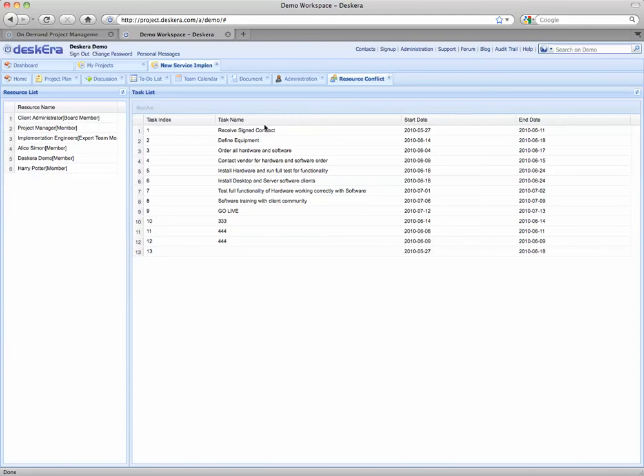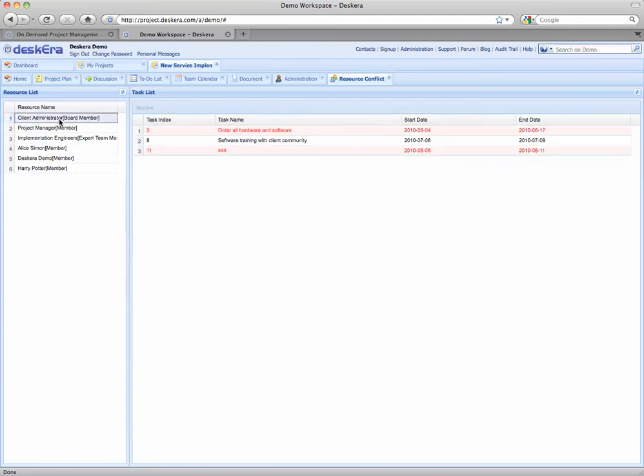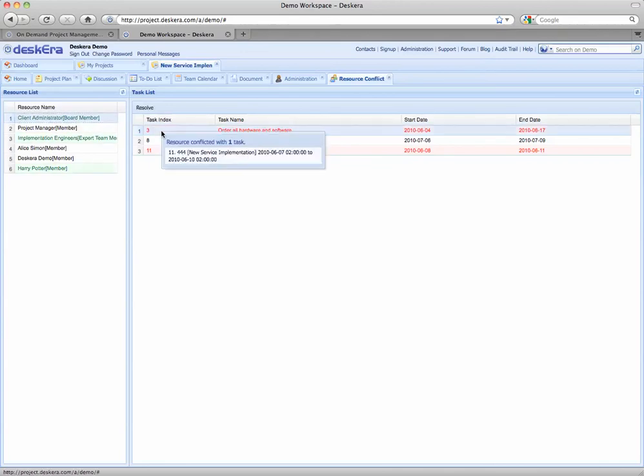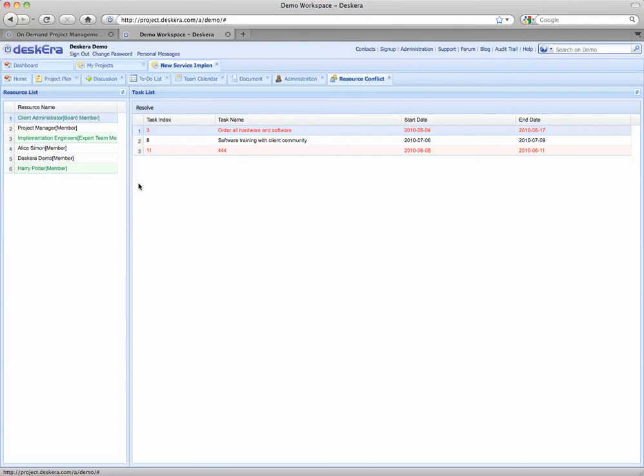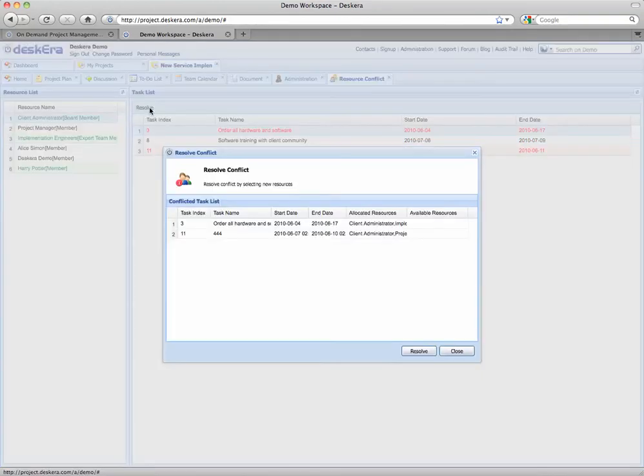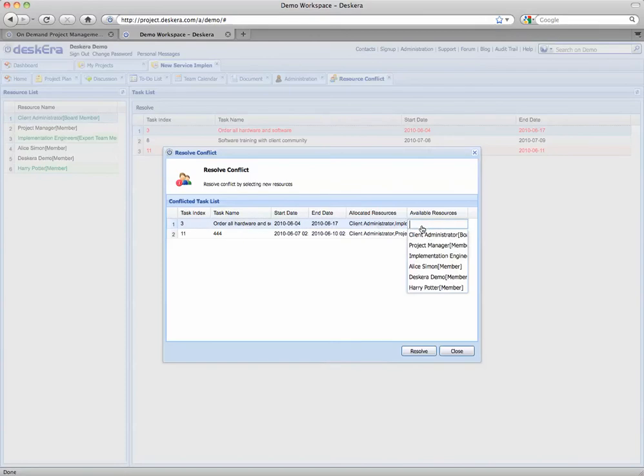From here you can click on a resource and see where the conflict is happening and avert any issues this may cause. You'll notice the tasks for each resource are listed on the right and conflicts are listed in red. By clicking here to resolve it you can allocate a different resource from the dropdown list to cover the conflicting task.